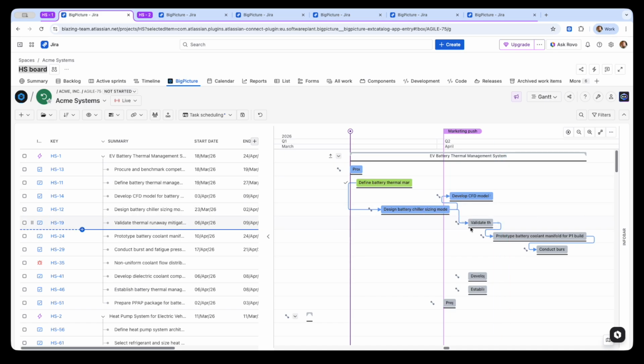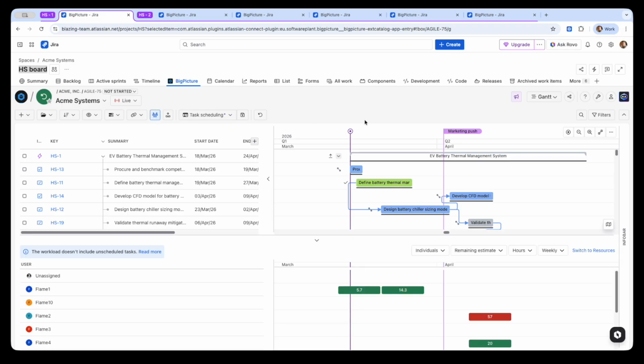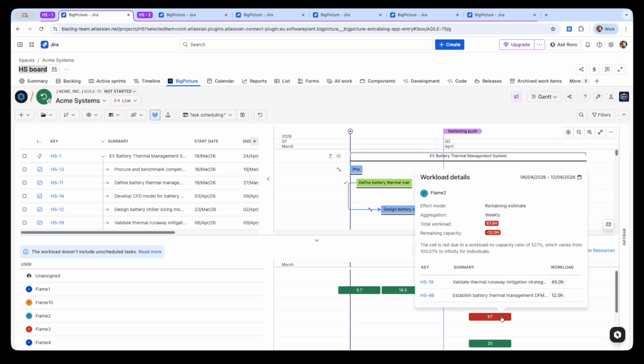First, we'll use a marker to flag this, as it's not in any plan of ours. However, checking my tasks for that month, I cannot bring some forward, even though there appears to be buffer. What's happening? Well, it's time to look at resource allocations. Here, we see someone is overloaded, but the tasks seem appropriate across a couple of weeks, so we'll need to keep digging.